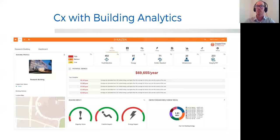And there's different types of analytics systems out there. But at a commissioning and testing level, we should be looking at this throughout that first year warranty period and beyond. Because that's when things are going to go sideways for us, or when we're going to have some of those major issues. And it's better to deal with those during warranty than having to deal with them afterwards, just like the way we run our cars, right?